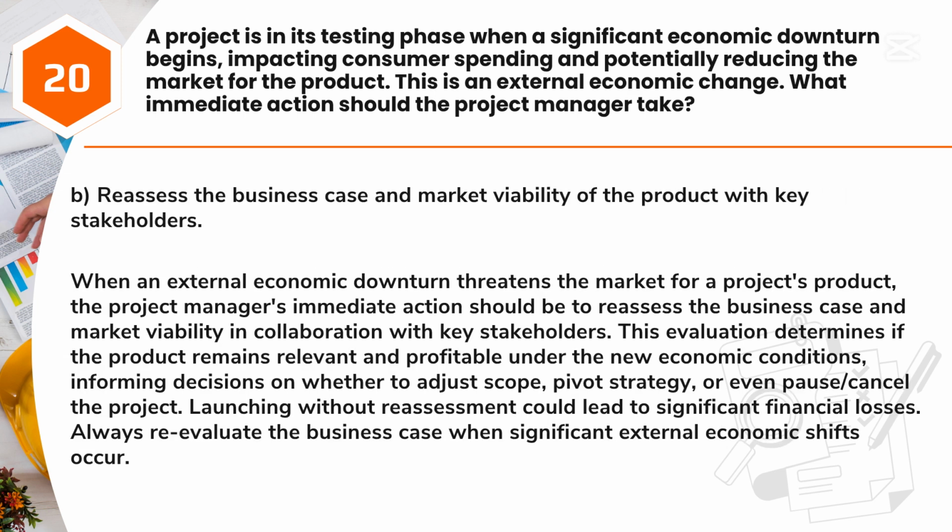Answer: B. Reassess the business case and market viability of the product with key stakeholders. When an external economic downturn threatens the market for a project's product, the project manager's immediate action should be to reassess the business case and market viability in collaboration with key stakeholders.